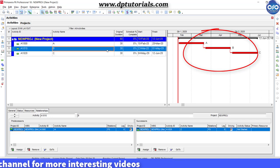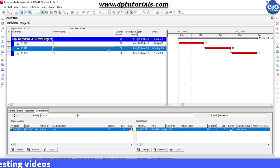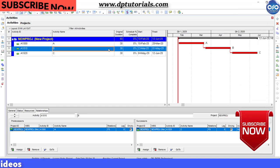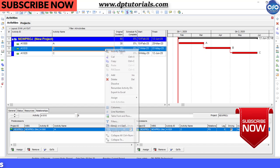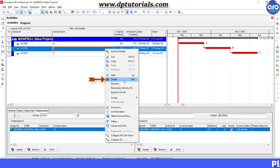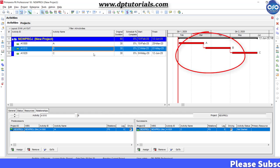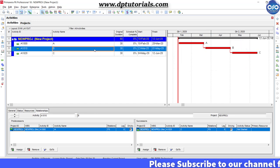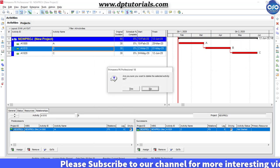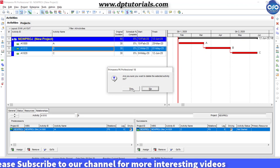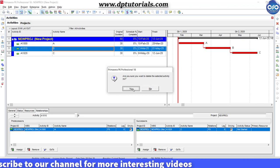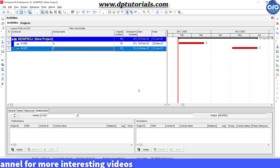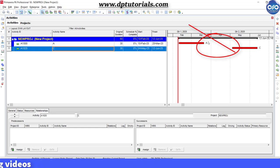Now suppose, assume that if you want to remove activity B from the schedule because of some changes in the project. If we directly delete activity B, you can see that the relationships will be broken from activity A and activity C. Right click and select delete. You can see that the relationships has been removed from activity A and C, which is not a good practice and not recommended at all.